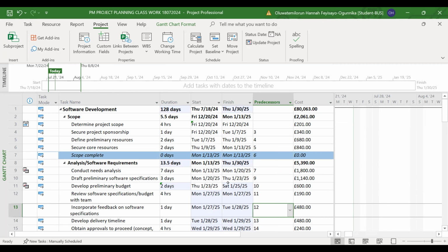Just create a copy of your standard calendar, then highlight every one of those days and make it a weekend. So you don't use weekend working for the entire plan. You only use it for the activity you're trying to do over the weekend. Does that make any sense to anybody?